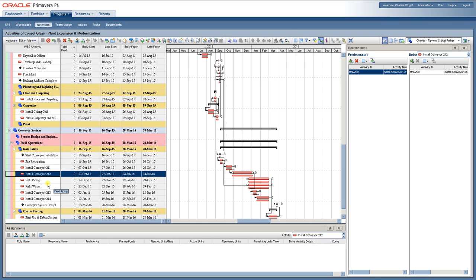And this part would need an experienced planner. An experienced planner would know that for a conveyor, you're looking at around, and I know the planning fraternity is going to jump down my neck on this, probably about 20 man hours per metric ton of conveyor installation for under 10 meters. But I still have to look at pulleys, idlers, lengths of the conveyors, the splices, etc. So let's not go into that.